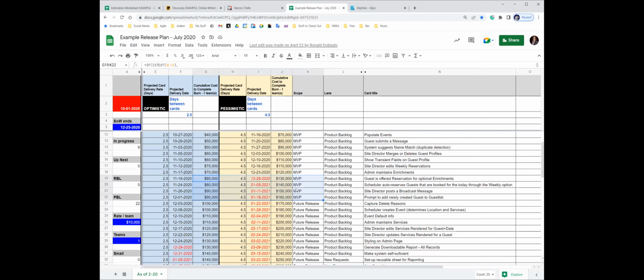get this done? And we rebuild this every 2 weeks. Every 2 weeks, I take all the new data, I dump out the Trello board again, I take all the data from those statistics, and I rebuild this, and we go over it every 2 weeks to manage expectations. Because it's all about, is this juice, what you're going to get here, worth this squeeze, whatever the amount of money it is? And again, it's always that range. It's going to be somewhere in between there.